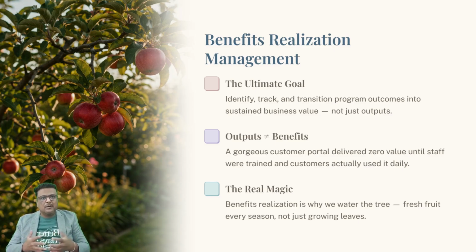Let me share a quick workplace story with you. I once audited a digital transformation program where the team built a gorgeous customer feedback portal. It looked amazing, but nobody monitored whether customers actually used it, and the company's customer satisfaction scores didn't budge an inch. We had outputs but zero realized benefits. We had to pivot, train the staff, and market the portal until customers started using it daily. That is when the real magic of the standard kicked in.